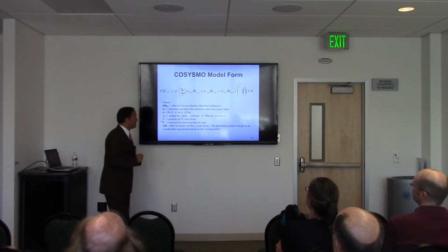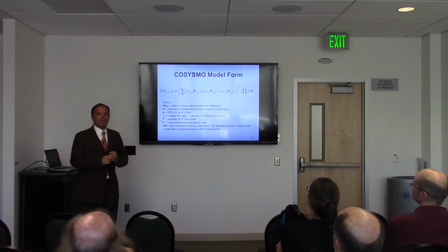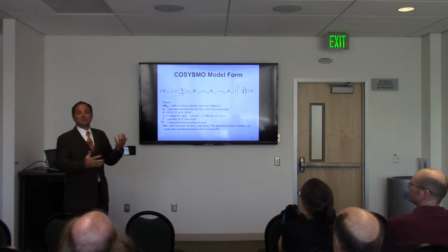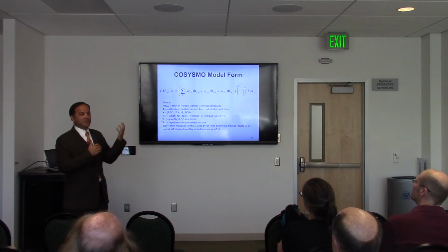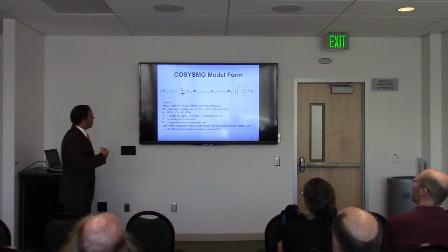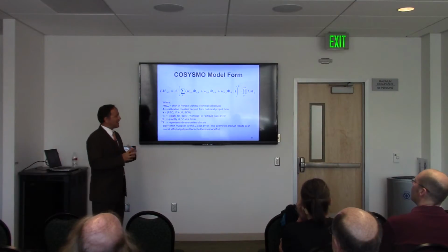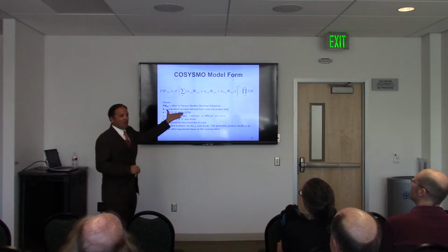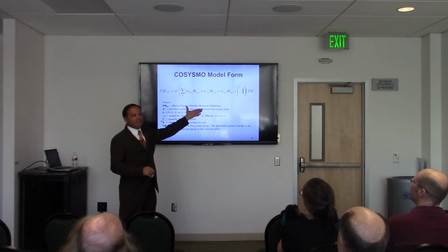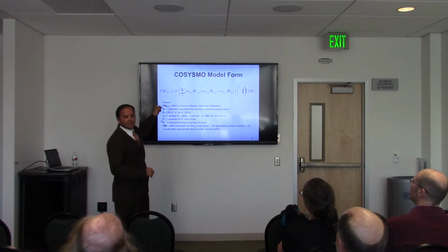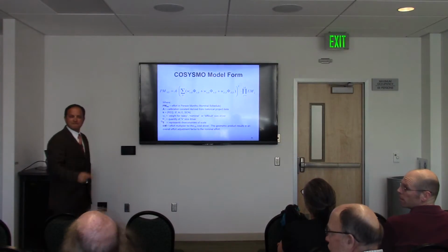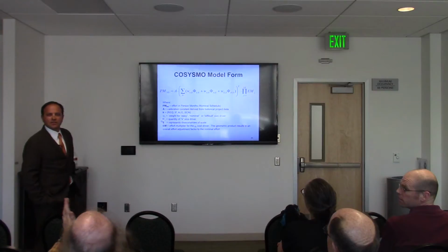Immediately to the right of the equal sign, we have a calibration constant. So the value for A is influenced by historical data that we go out and collect from those industry participants. So formally it's called calibration constant. I like to call it the fudge factor, right? Because it helps us translate all the technical inputs on the right side of the equation into person month units. How do you know if your fudge factor is correct, or at least fudging in the right direction?